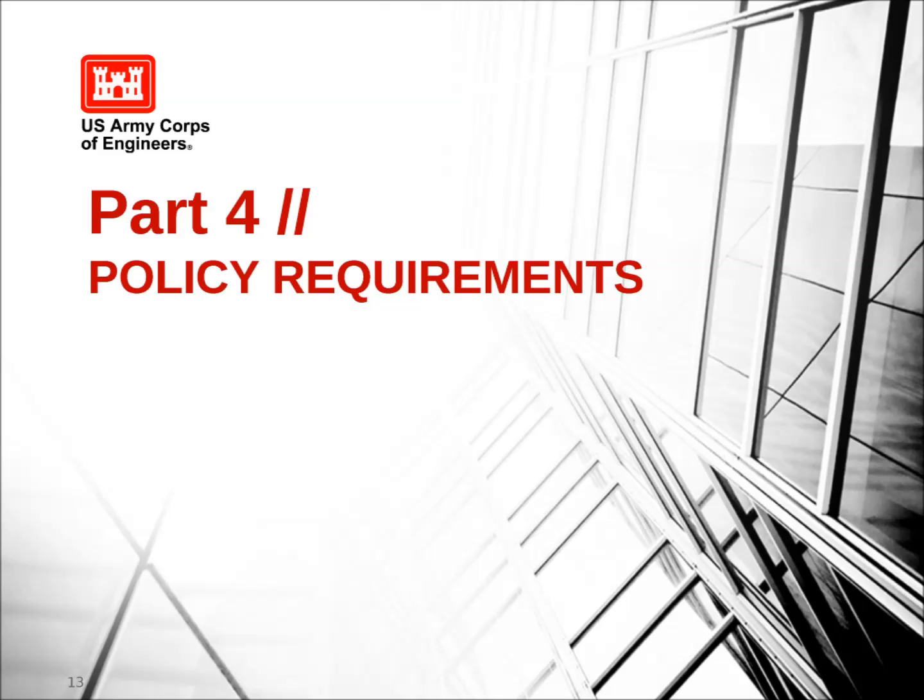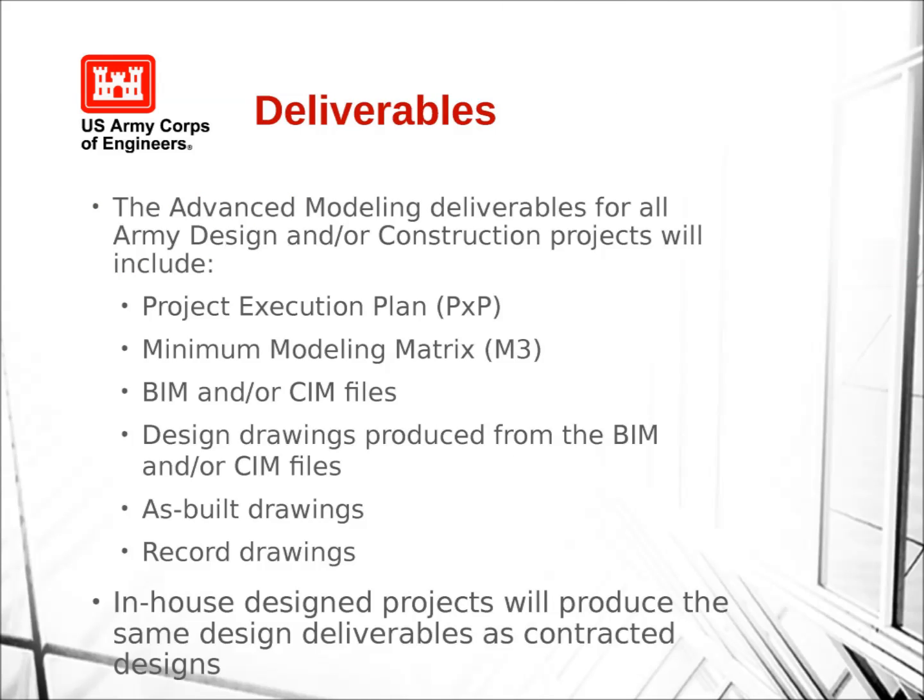We do have a little bit of a difference when we're looking at the deliverables. If we're looking at Army design or construction projects, not only do we want the design deliverables such as the PXP, the M3, the native format BIM and or SIM files, plus the design drawings that are produced from those BIM or SIM files, be they in Autodesk or Bentley format or whatever, we would also, from a construction standpoint, want to make sure that we captured as-built drawings and record drawings, and depending on customer requirements, any record BIM and or SIM files.